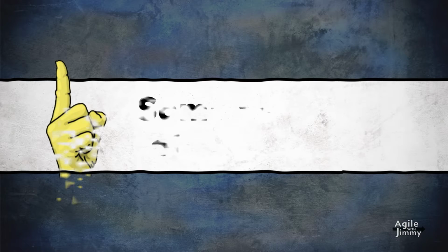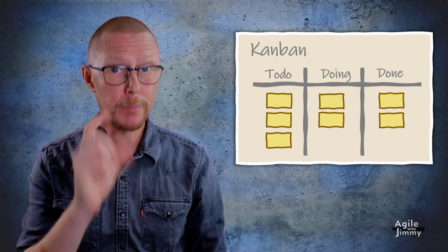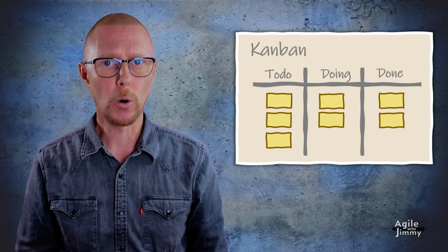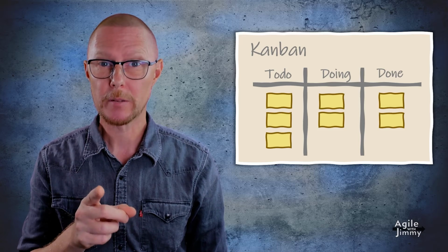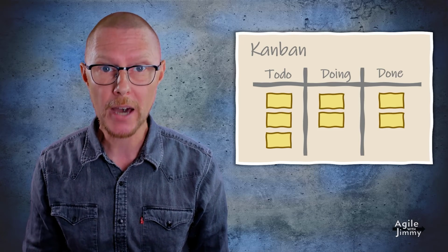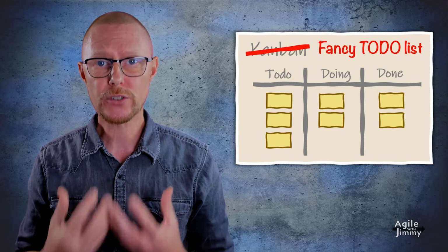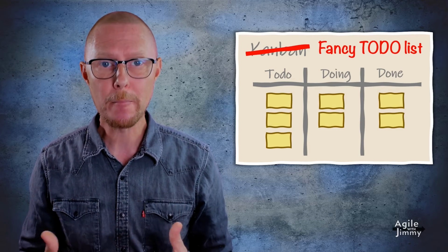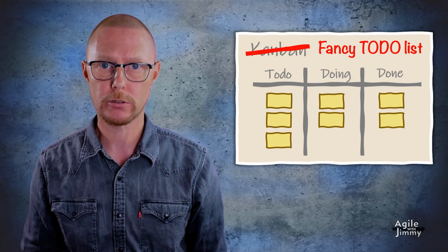If Kanban sounds like something exciting, a word of warning, a word of advice. Allow me to be perfectly clear. If you have a board like the one next to me here, if you're not measuring lead time, you're not doing Kanban. It's just a fancy to-do list. Without the time boxes of Scrum or WIP limits of Kanban, you ain't getting the benefits of either approach.